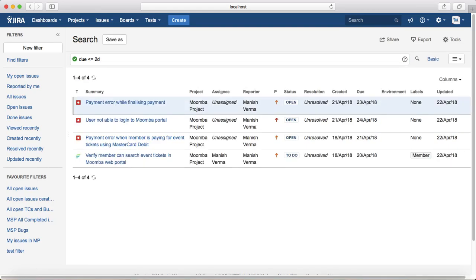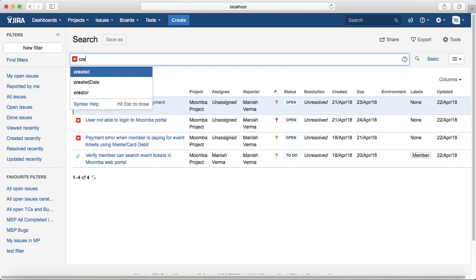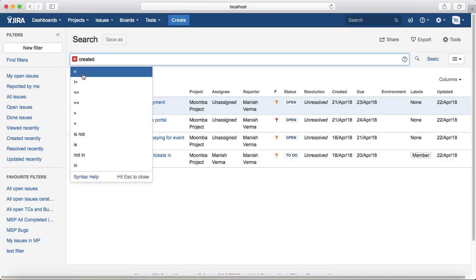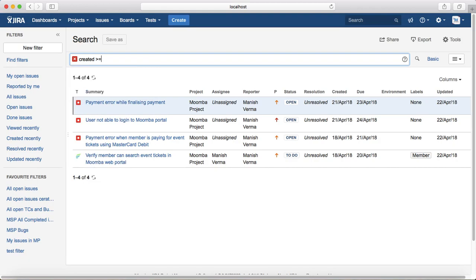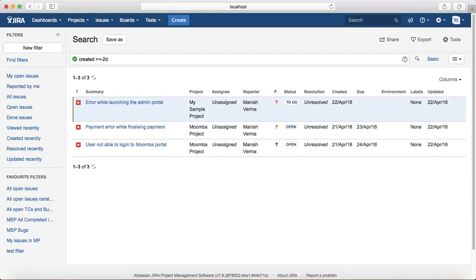Last example: you want to see issues created in the last two days. The query is created greater than or equal to -2d, and it will list all the issues created in the last two days. You can see the issues created on 21st and 22nd April are listed here. That is all about searching with dates in JQL. In the next tutorial we will learn about searching with text. Thank you.